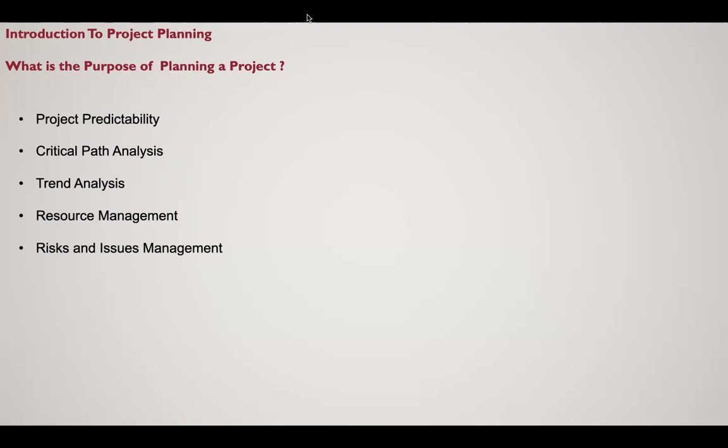And the client will appoint a principal contractor as well. That principal contractor could be any company, and if they're building a house, for example, he will employ bricklayers, carpenters, and joiners as contractors. In each of these, the principal contractor would have a project manager, while all other contractors or the designer could have project managers too, that they will be relating to each other. The client doesn't want to relate with all these contractors. He wants to relate with the PM of his principal contractor or principal designer. So you could have those PMs at that level interacting with each other.